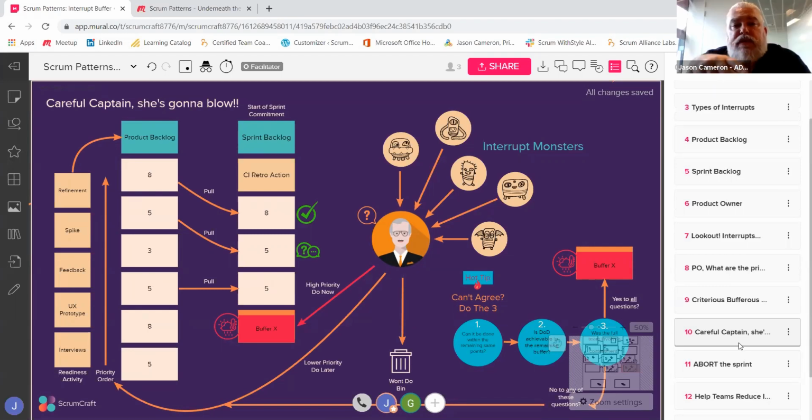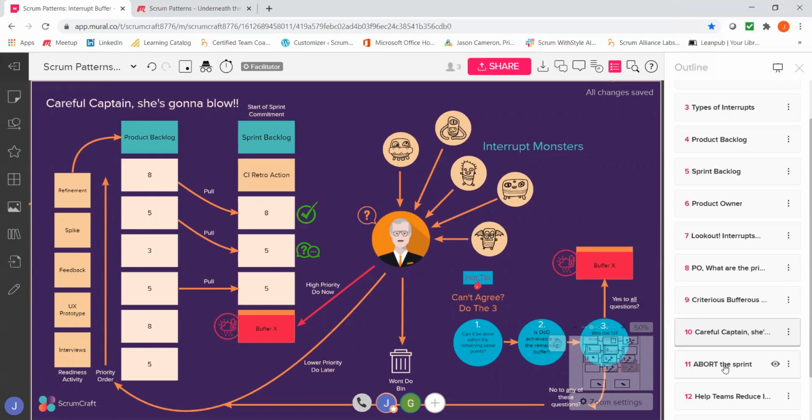Yeah, absolutely. And if you were to do that, you would have to replan the sprint, wouldn't you? You'd have to say, well, I'm actually changing the context of my commitment now. And really you need the team involved, everybody doing the remaining work, to recommit to a change of vision or a change of goal for that sprint. In the alternative, the product owner says it's only 1 point above, what's the worst thing that can happen?